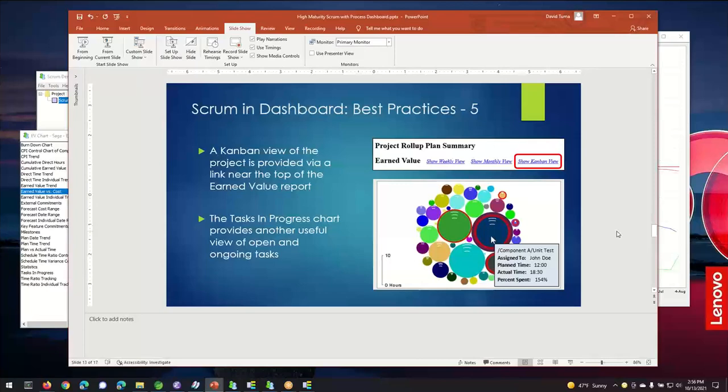For example, if there was a particular work item that you thought was going to take 12 hours, or thought it was 10 story points, and it turns out to be much larger than you thought, then this work in progress chart gives you really quick feedback and insight into that. You can identify which work items might be having trouble and see if those things might need replanning or attention, or if the team might need to come in and help a particular individual with that work item.